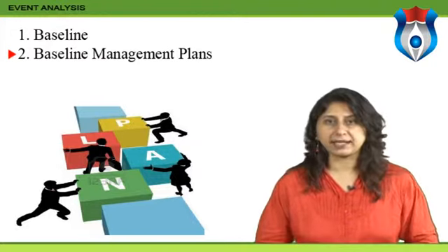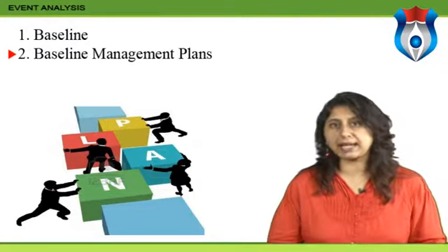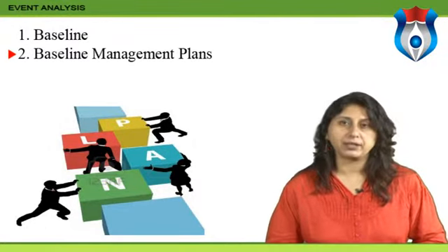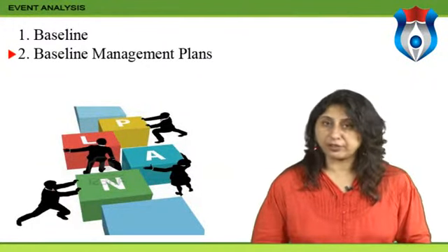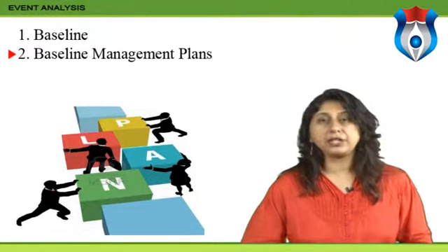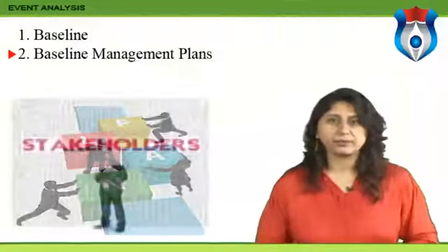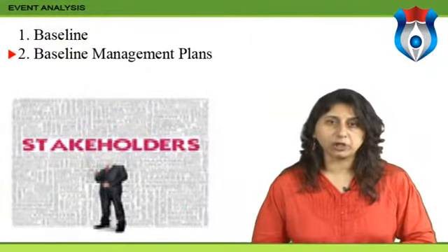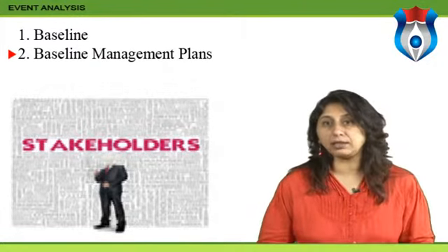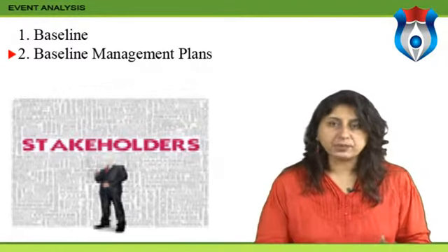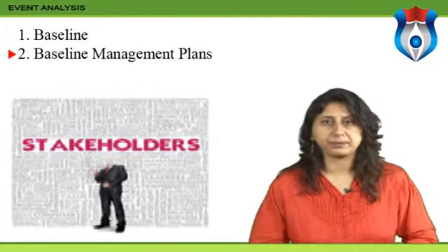Baseline management plans. These plans include documentation on how variances to the baselines will be handled throughout the project. Each project baseline will need to be reviewed and managed. A result of this process may include the need to do additional planning with the possibility that the baseline will change. Project management plans document what the project team will do when variances to the baseline occur, including what process will be followed, who will be notified, how the changes will be funded, etc.